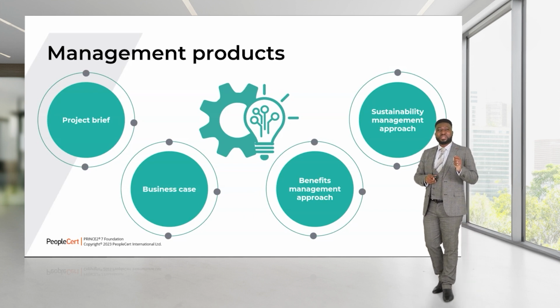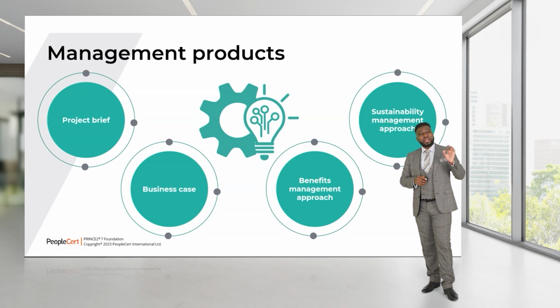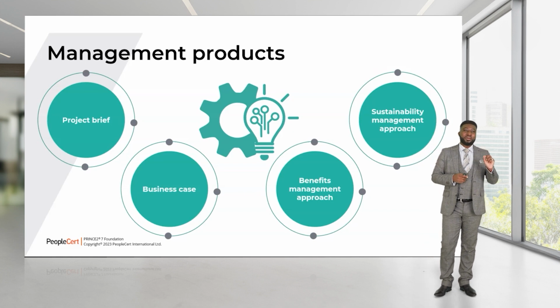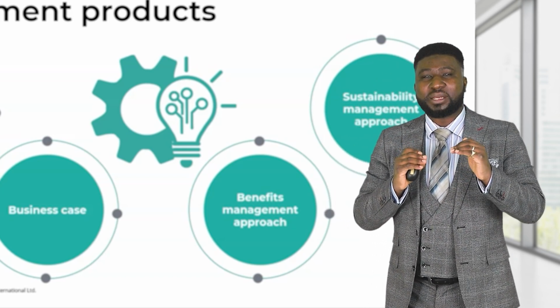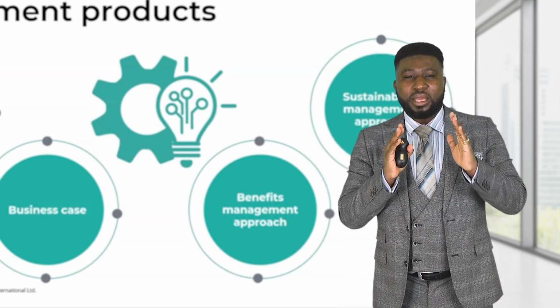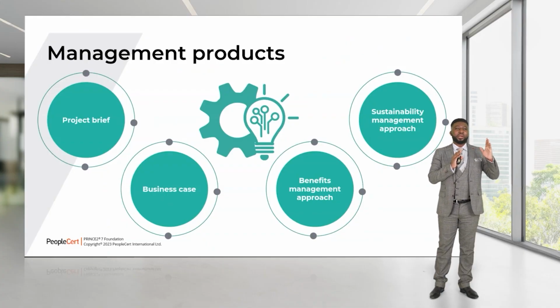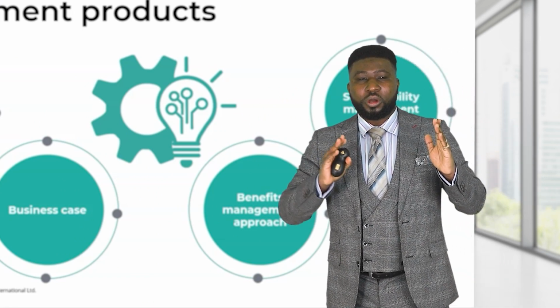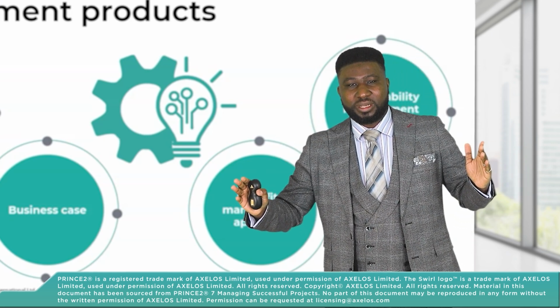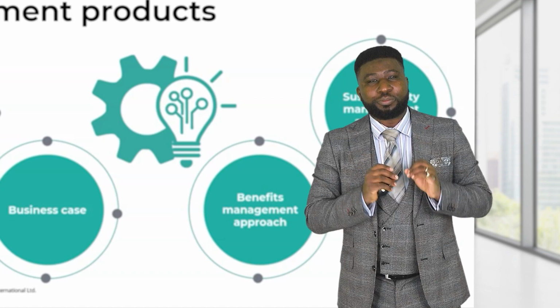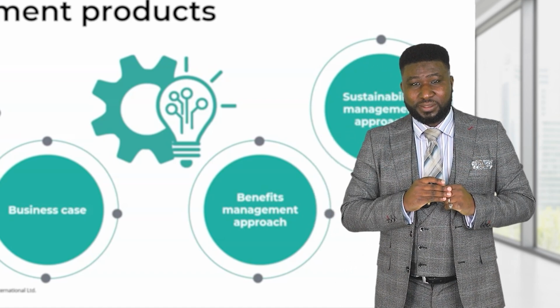When we are refining our business case in the initiating a project process, there is an output. So another document is created as a result of this. That output is called the benefit management approach. The benefit management approach is designed, basically, think of it this way. If the business case is intended to check whether the project remains viable, achievable, and desirable from start, think of it as starting up, to closing a project process. From the start of the project to the end of the project, till you create your output. Once your project finishes, that's the end of your business case.